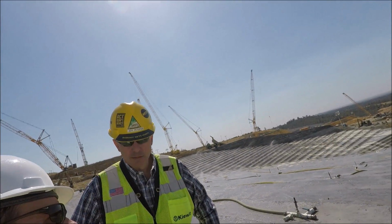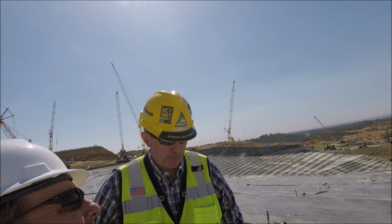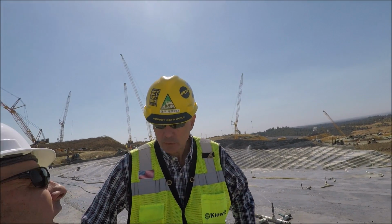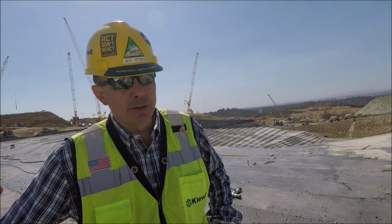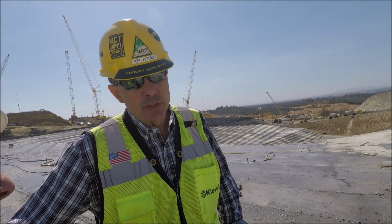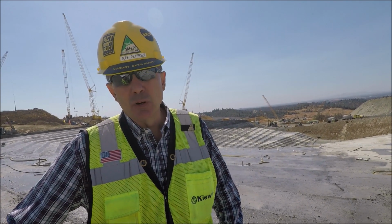And because this got to be a little bit bigger than the original plan, not only did the cost go up, but you had to import rock for your RCC operation? We actually have enough. We're making all the rock for the RCC, but that used up any rock that we would use for the wall backfill. And so we're having to make up a small difference of that by importing wall backfill rock.